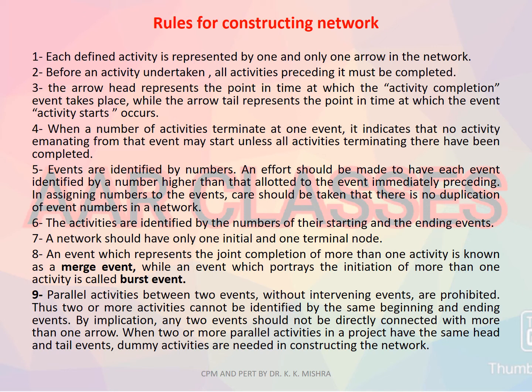Seventh, a network should have only one initial and one terminal node. Eighth, an event which represents the joint completion of more than one activity is known as a merging event or merge event, while an event which portrays the initiation of more than one activity is called a burst event. Last, that is the ninth rule of this presentation as far as rules are concerned.